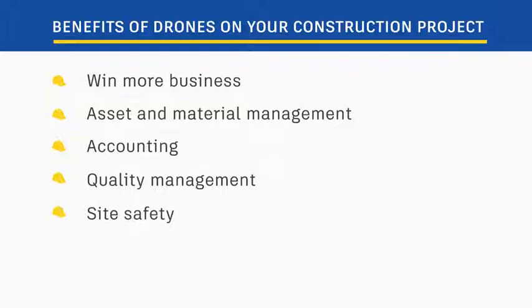Safety programs are another area that are providing very strong value for main contractors with drone programs, especially for performing inspections in dangerous areas. One of our partners tells us that on many projects they work on, accessibility to the site is a major issue, and it may change from one phase of construction to the next. They're using drone site images to figure out and communicate broadly to all people on site, both access and egress on the project.